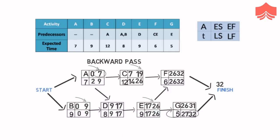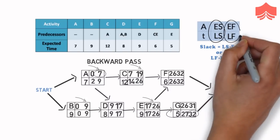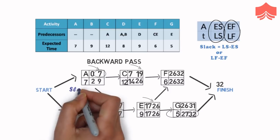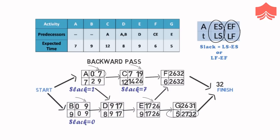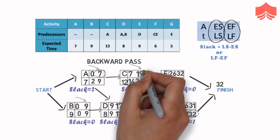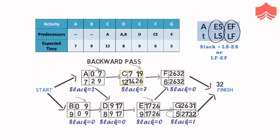Now let us calculate the slack for each activity. Slack is the delay which we can allow in an activity such that it does not cause any delays in the deadline of a project. The formula for calculating slack is LS minus ES, or LF minus EF. So for A it can be 2 minus 0, or 9 minus 7, which is 2. For B it will be 0, 7 for C, for D, E and F it will be 0 again, and for G it will be 1. The slack of 7 days in C shows that it can be delayed for 7 days without causing any delay in the project. C can begin any time between day 7 and day 14, and it can end at any time between day 19 and 26.